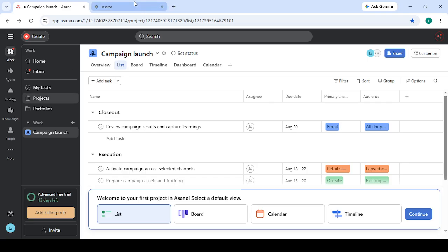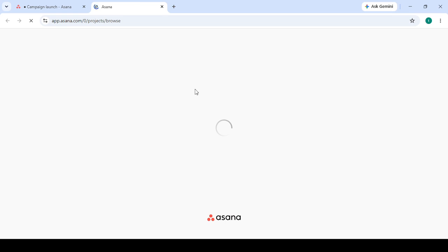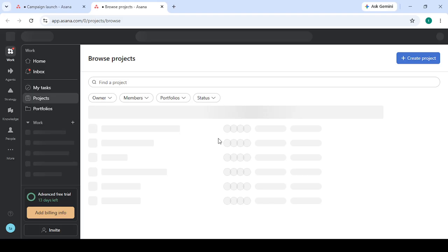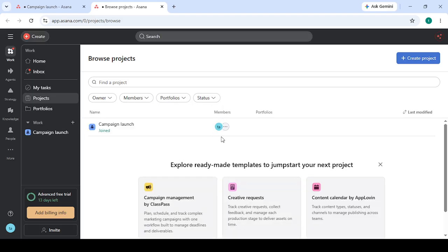Once the main task is created, the next step is to break the work into smaller parts by adding subtasks. These subtasks will act as your review checklist and help you track progress more precisely. For example, you might create subtasks such as outline, draft, proofread, and format. This is useful because instead of treating the document as one large task, you can see exactly which stage is complete and which stage still needs attention. It also makes collaboration easier if other people are involved in the review process.